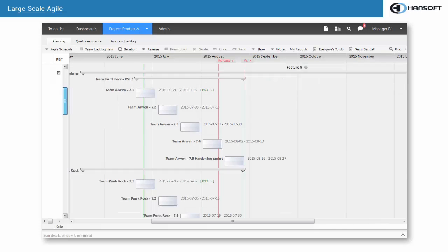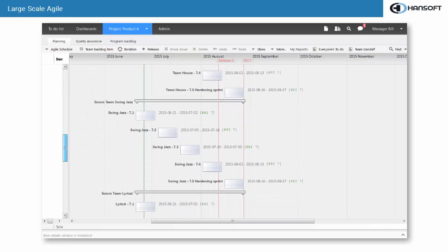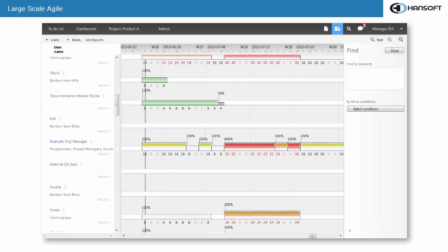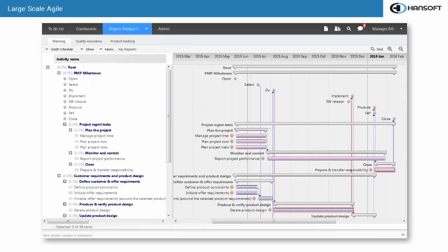The primary level of coordination is on product level, but some planning across the products is necessary for a number of reasons. Some of the developers with special skills are shared, so resource allocation needs to be central. Products are aiming for the same market, so go-to-market plan and release schedule benefit from being coordinated. And the company wants to present a homogeneous product offering, so all the products should be compatible with a defined set of technology and integrate with certain tools.